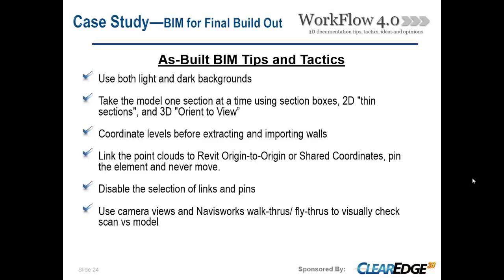Disable the selection of links and pins — that's probably the best way of keeping your young staff out of trouble. Use camera views and Navisworks walk-throughs and fly-throughs to visually check the model before delivering it. When you think you're totally done, drag cameras into the Revit model and walk through. When you have the point cloud overlaid with the model, things will immediately start popping out. Camera view is difficult to work in, but it's a great inspection mode, and so is Navisworks.